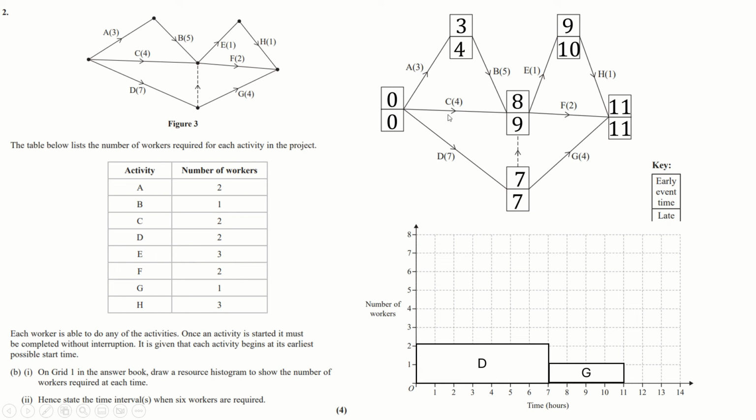Now let's fill in A, and C maybe because those are the other things we can start with. So I'll fill those in like that. They both take 2 people and take that many hours. We can start B, I should say, actually, is the next one to start, isn't it, after A? We can start B as soon as A is done. Now B takes 5 hours.